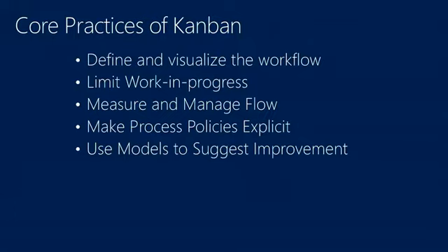So just to review, Kanban is about defining a workflow, pulling individual items through the system individually, and not doing it in a time box. And then how do you do it? You basically distill all your work items down to the same size, which is easy to do when you're building cars. But Toyota has a Prius, so they have electric cars, they have SUVs, they have minivans, they have trucks. So then they have a Kanban process for each one of those.